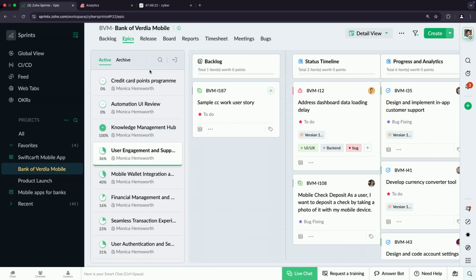Epics, these are stories that stretch across sprints. So one epic might be user engagement and support enhancements. That's going to be ongoing. You're going to have tasks related to that in sprints, probably for the end of time until this product or this app disappears, right? You're constantly going to be trying to enhance your support process. So that won't be just one sprint. So you can tie different tasks to this epic across multiple sprints and the entire project.